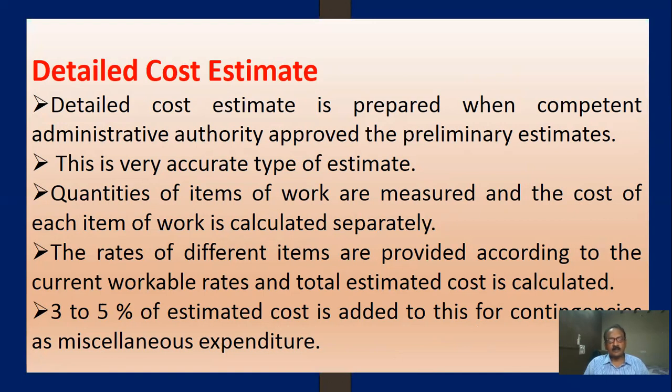SSR rates, SOR rates, or local rates are also required. A detailed cost estimate is prepared when the competent administrative authority approves the preliminary estimates.